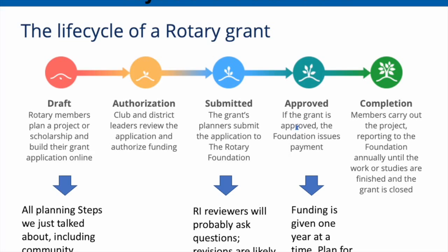One of my suggestions to you is that because this funding is year 1 and year 2, and the reception of a check for year 2 is predicated on the acceptance of your report for year 1, you probably want to take care to include a bit of year 2 in that initial year funding, just in case your report is either delayed on your part or their part. In any case, now that you are ready to go, your grant is approved, your first year funding is in hand, you're ready to go to work and begin the grant.